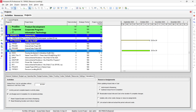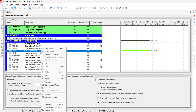The priority level you assign depends on project circumstances. For example, educational projects may need to finish before a new session starts, so they have higher priority. Government projects may also have higher priority. Once you define project priorities, right-click and open the project.